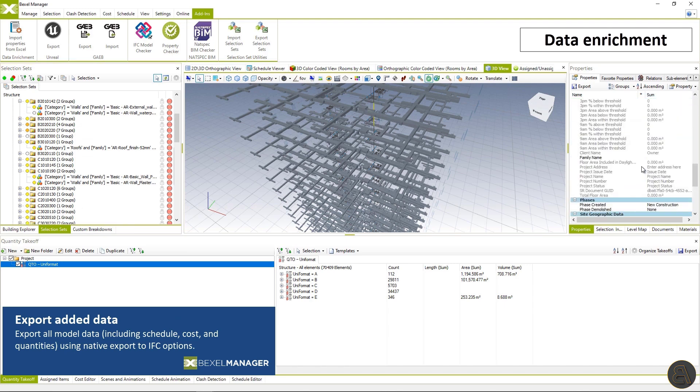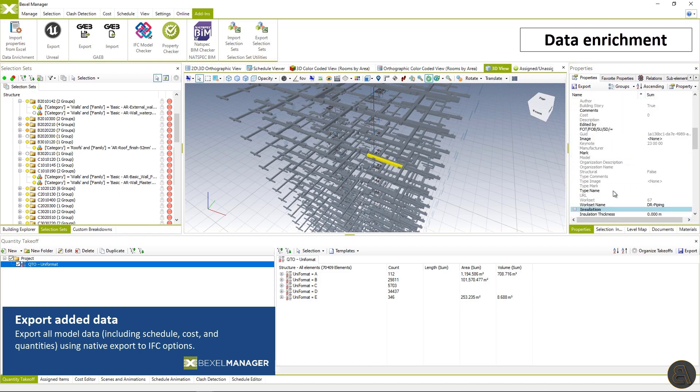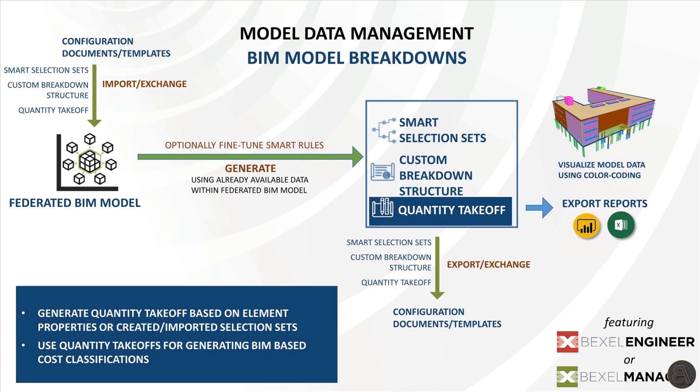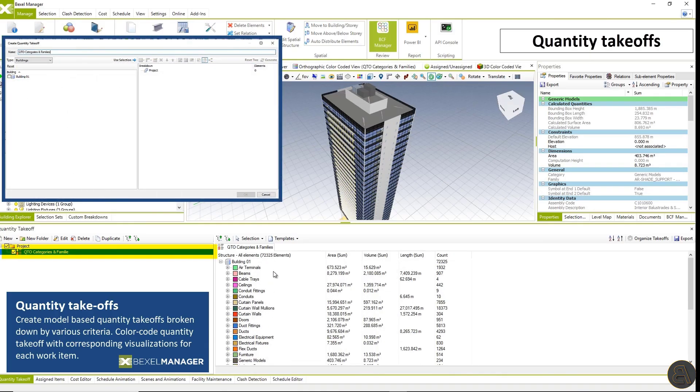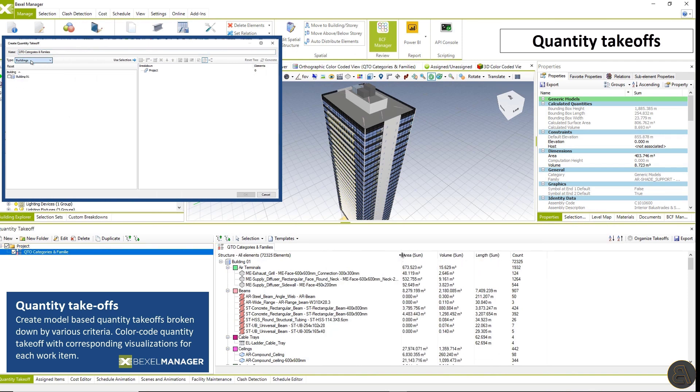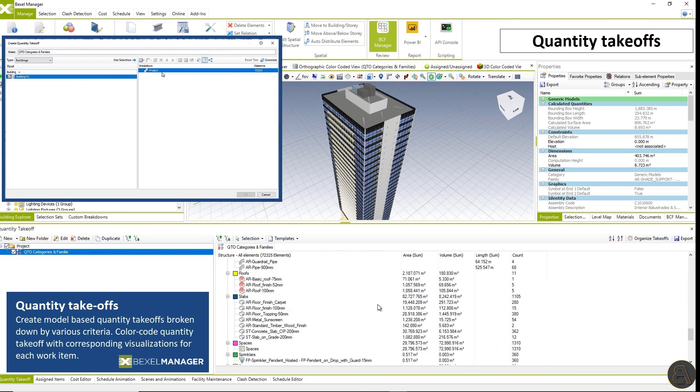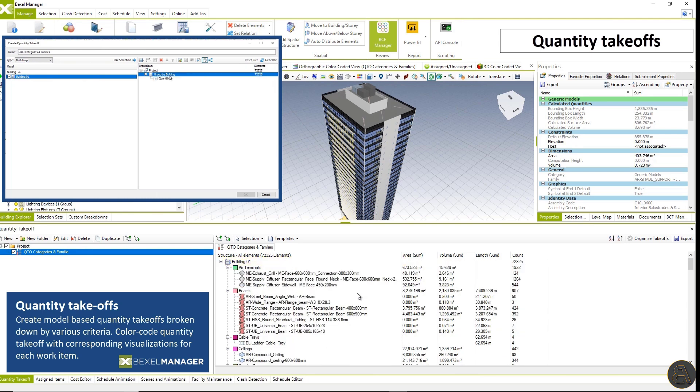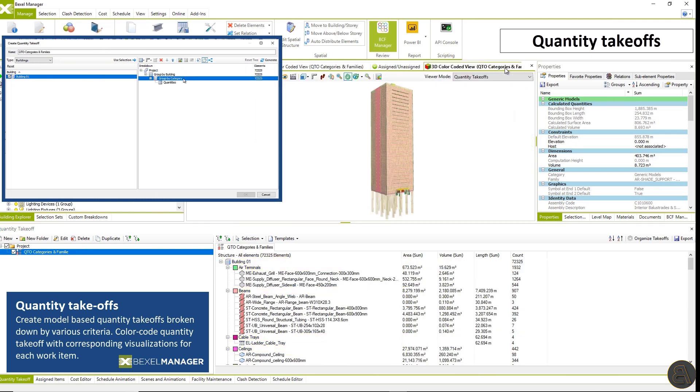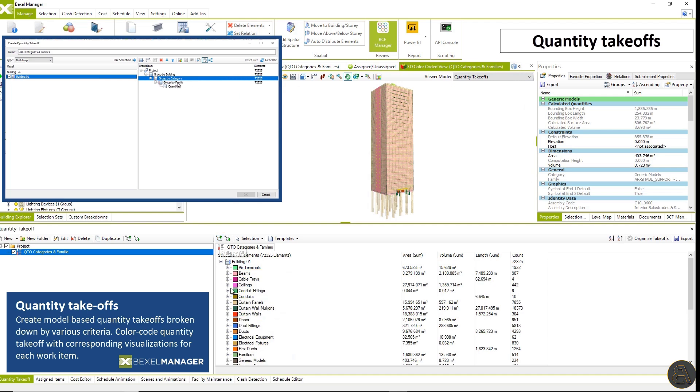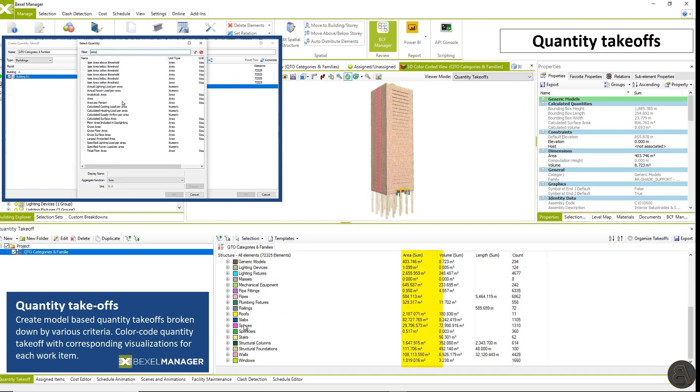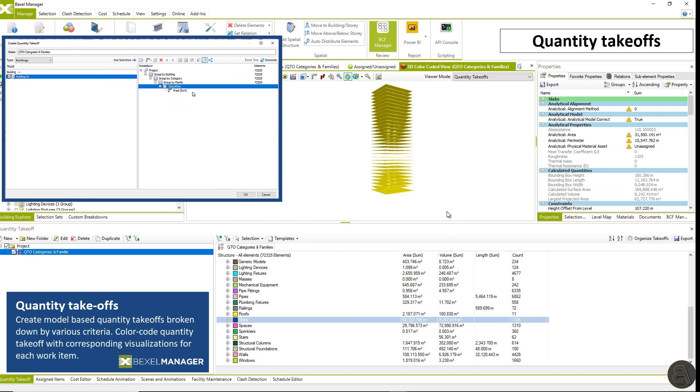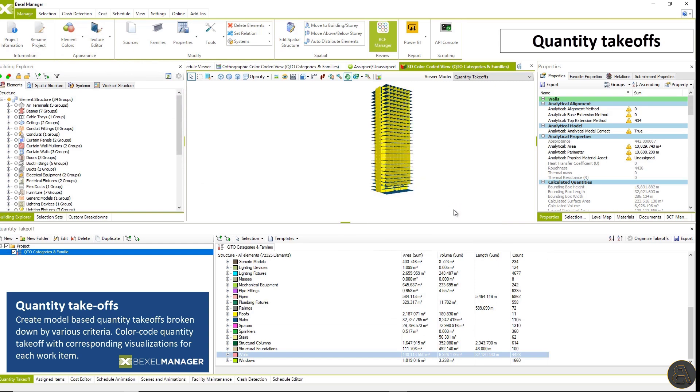Now you can explore and visualize added data using color coding custom breakdowns and of course export all models and all model data to IFC format. Automated quantity takeoffs based on element properties are very useful for generating work breakdown structures. And in the integrated BIM workflow QTO is a very important step where quantity takeoff structures are used as a base for cost classification structure.